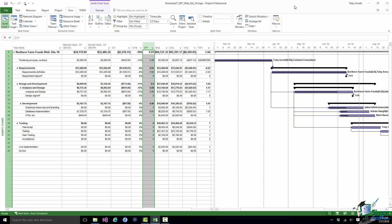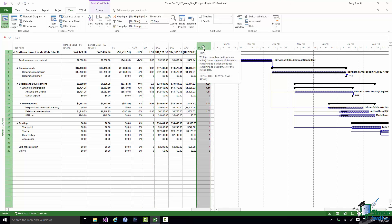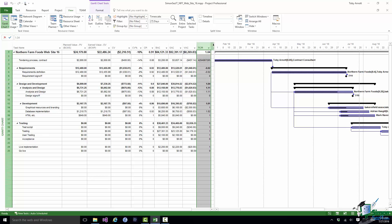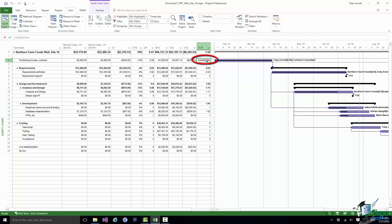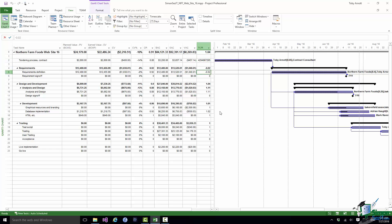The final column there is TCPI and TCPI stands for To Complete Performance Index and the values here are intended to indicate what needs to be done to keep the project on cost. Now I don't think this particular column has been implemented quite correctly yet because you do get some rather strange values. For instance this huge number here against Task 2. Well Task 2 is complete so there is nothing to do to complete it and I think it's rather misleading having that number here. And also with TCPI there isn't just one formula for calculating it. The formula for calculating TCPI is dependent on the status of a task. So values like this one, –0.02 can be somewhat misleading. So I'm not going to look at TCPI. We don't need it at the moment.